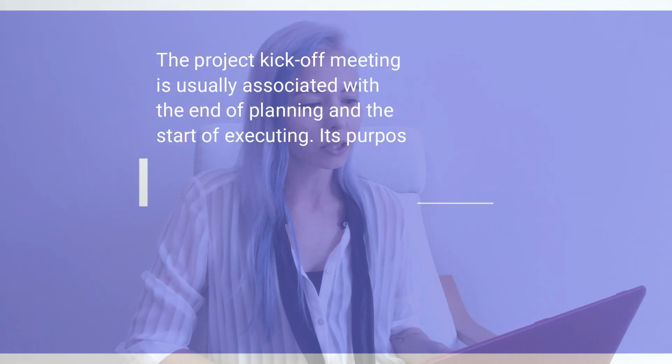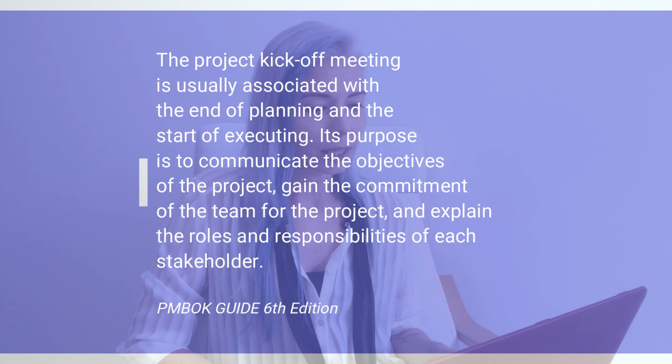Let's have a look in the PMP Guide 6th edition and find out what we have there for the project kickoff meeting definition. The project kickoff meeting is usually associated with the end of planning and start of executing. Its purpose is to communicate the objectives of the project, gain the commitment of the team for the project, and explain the roles and responsibilities of each stakeholder. There is an additional part in the definition which outlines that normally on large projects the kickoff meeting takes place after the planning phase, and on smaller projects we can start kicking off the project during the initiation.